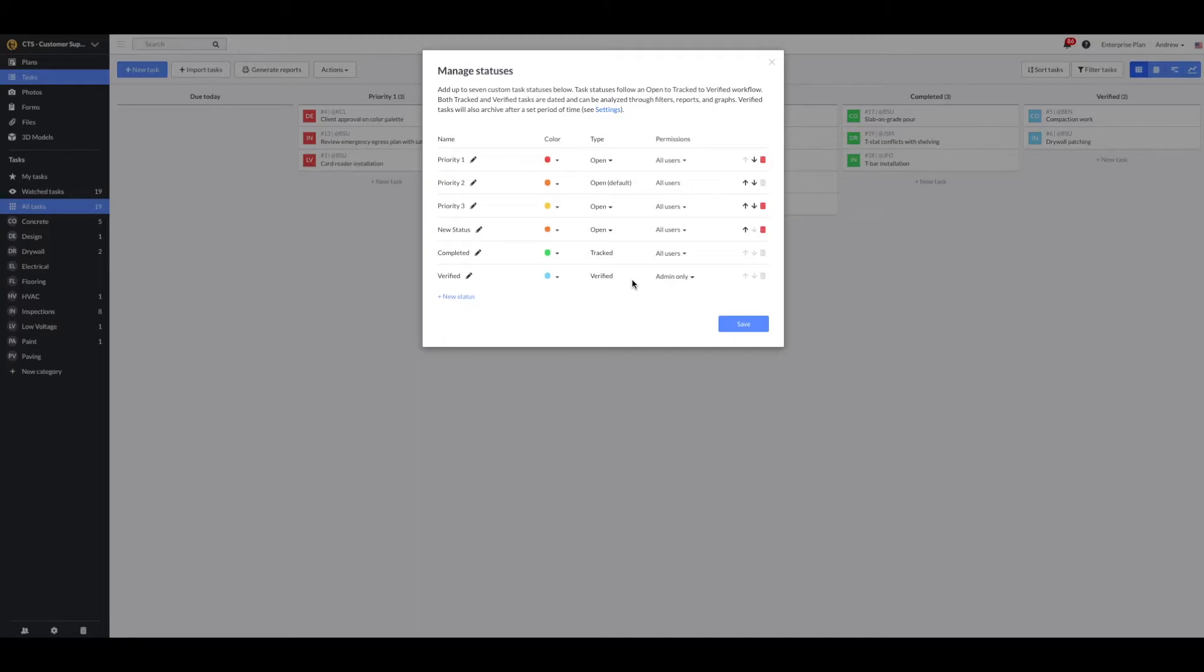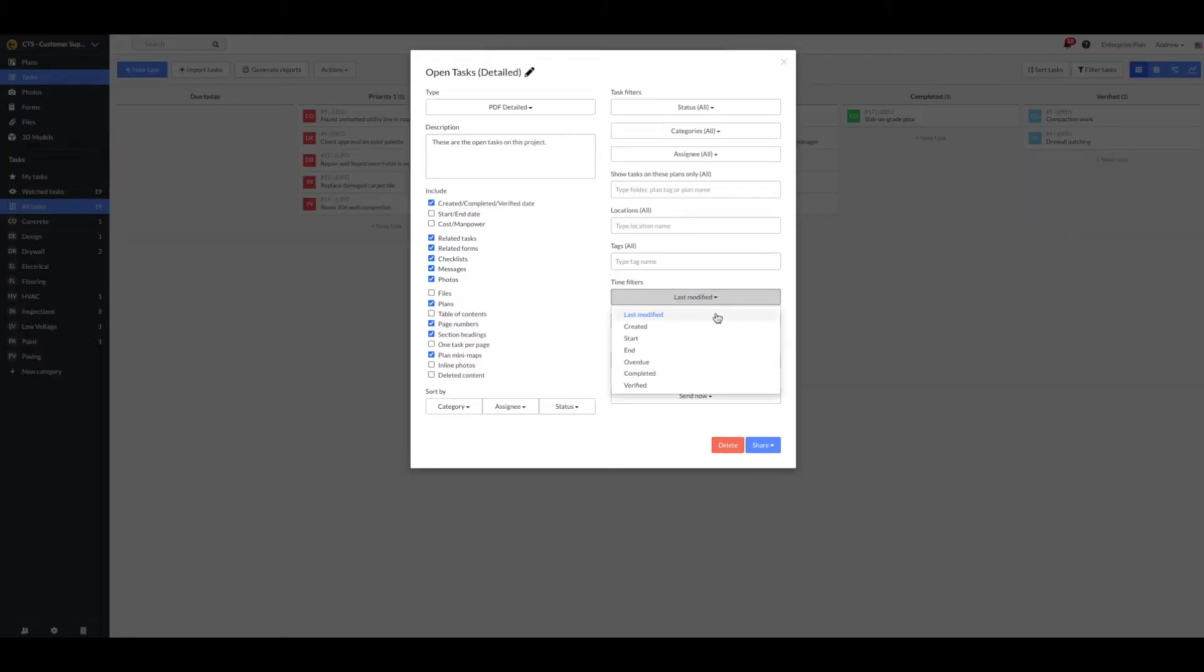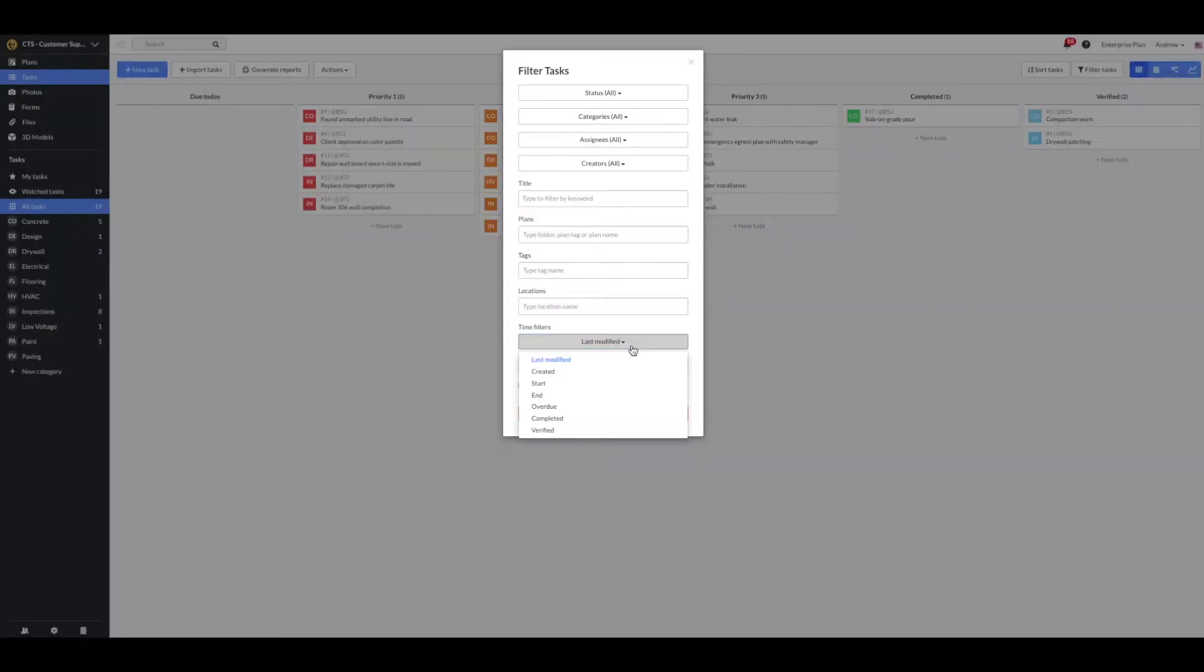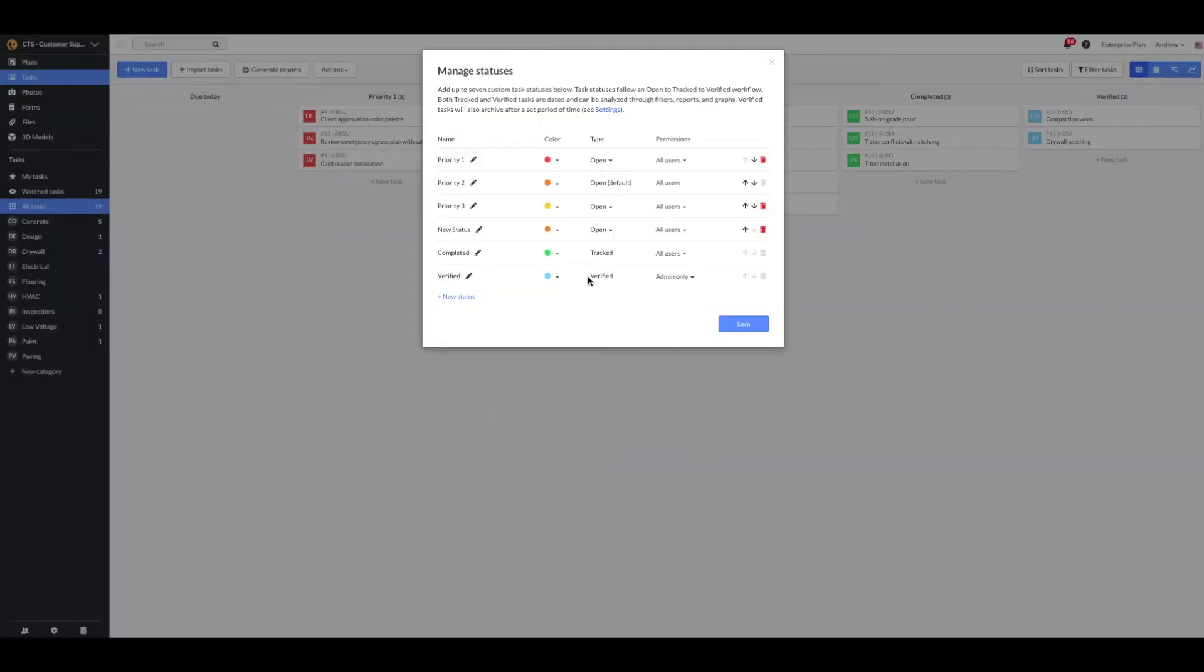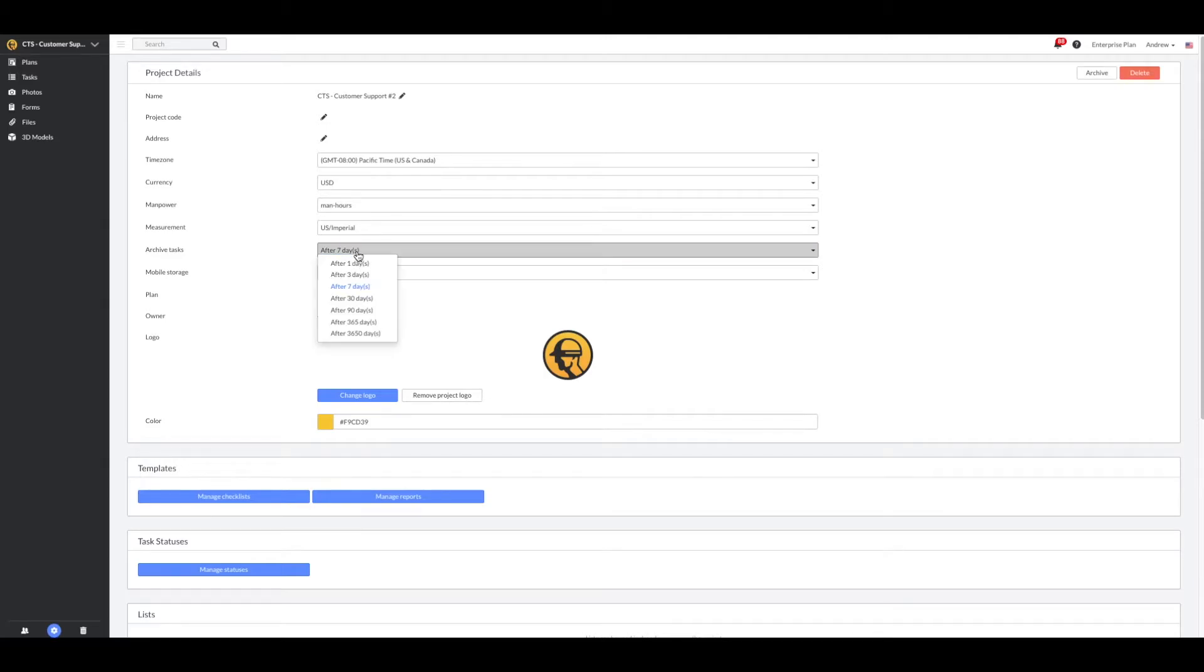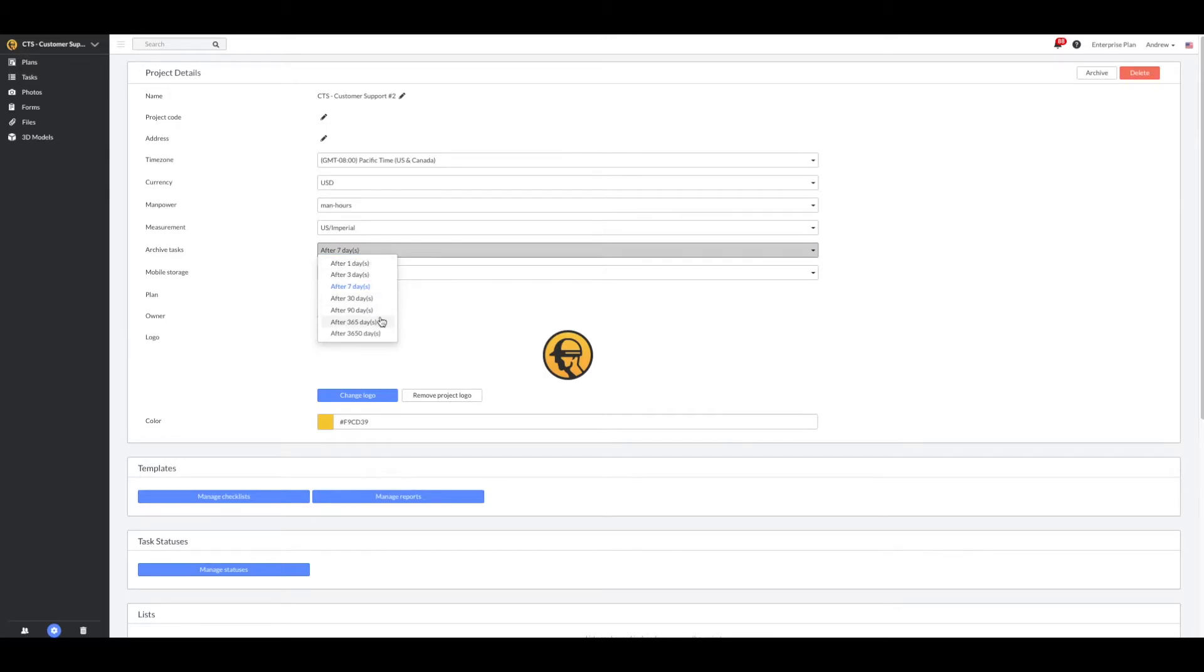Fieldwire will record the date the task was moved into a tracked and verified status, and it will use these dates when using any time filters in reports or while filtering tasks. While there can be several open and tracked task types, you can only have one verified task type. Verified tasks will archive after a set period of time, as determined under the Settings tab.